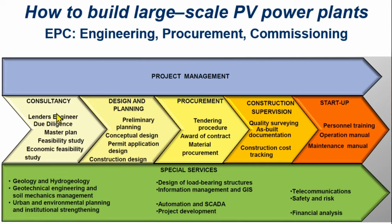It starts with some consultancy, due diligence, master plan, and feasibility study — especially economic feasibility study, because you have to gain money with it. You often have to lend money, and you have to convince the money lenders that the business plan is really OK. Then it's the concrete design and planning.